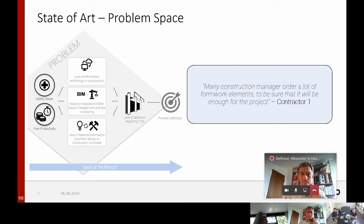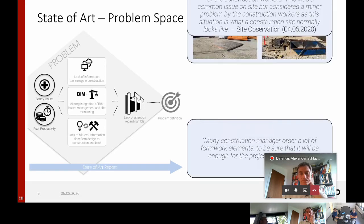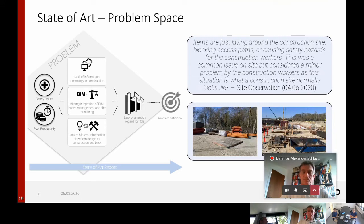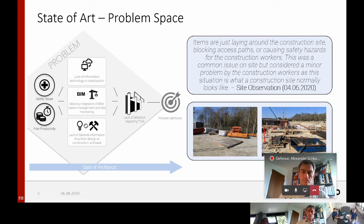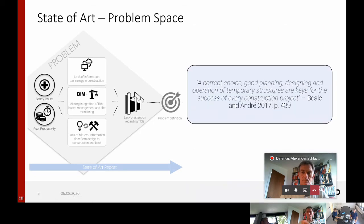Furthermore, Contractor 1 explained that many construction managers order too many formwork elements on site to be sure that it will be enough for the entire project. I also conducted a site observation on a real construction project, and although the construction site was normally good in shape, I identified that there are a lot of items laying around the construction site, blocking access paths and causing safety hazards for the construction workers. This was considered a minor problem by the workers as they see it as how a normal construction site looks. These statements clearly reveal the poor planning of temporary construction items on a construction site, although Biel and André from 2017 identified that correct choice, good planning, designing and operation of temporary structures are keys for the success of every construction project.